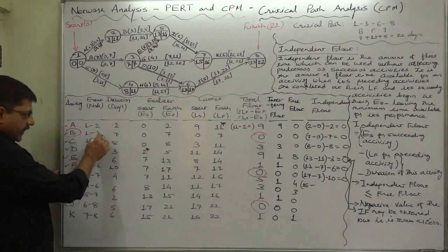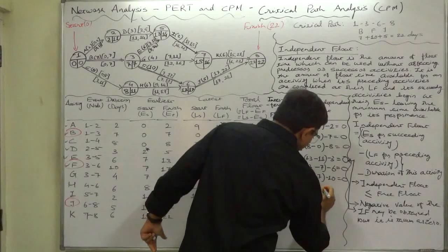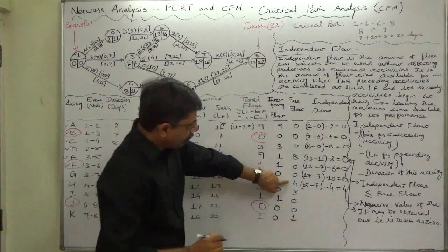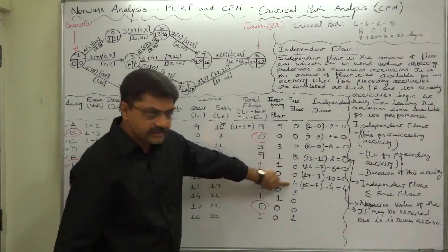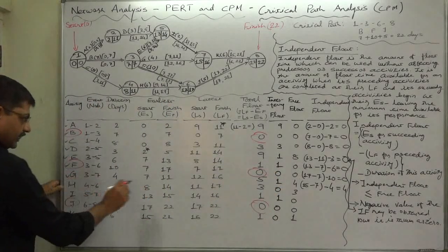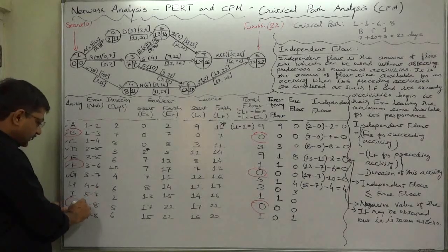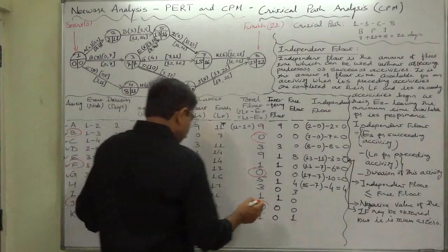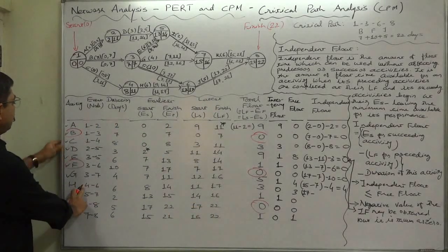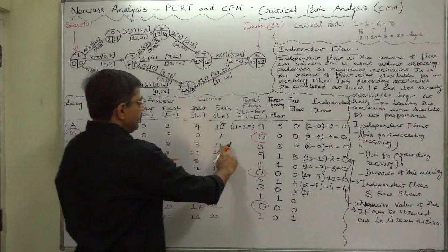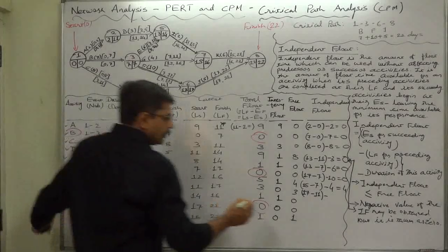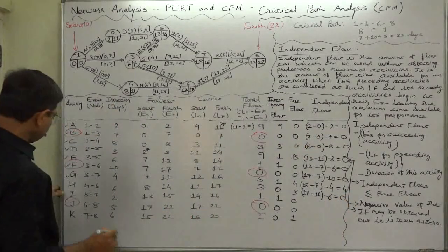Activity G (3,7): its successor is K, with earliest start time 15. G's predecessor is B, with latest finish time 7. So: 15 minus 7 minus duration of G (4) equals 4. Independent float of G is 4, which equals its free float — the maximum it can be. Activity H (4,6): its immediate successor is J with earliest start time 17. H's predecessor is C, with latest finish time 11. So: 17 minus 11 minus duration of H (6) equals 0.